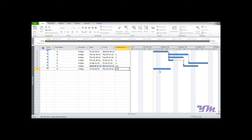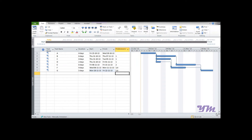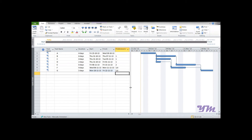Looking at the chart, Activity B starts once Activity A is completed — this is a Finish-to-Start relationship, meaning after Activity A finishes, Activity B starts. If you want to put a time interval between the finish of the first activity and the start of the next, this is called a 'lag' in project management.